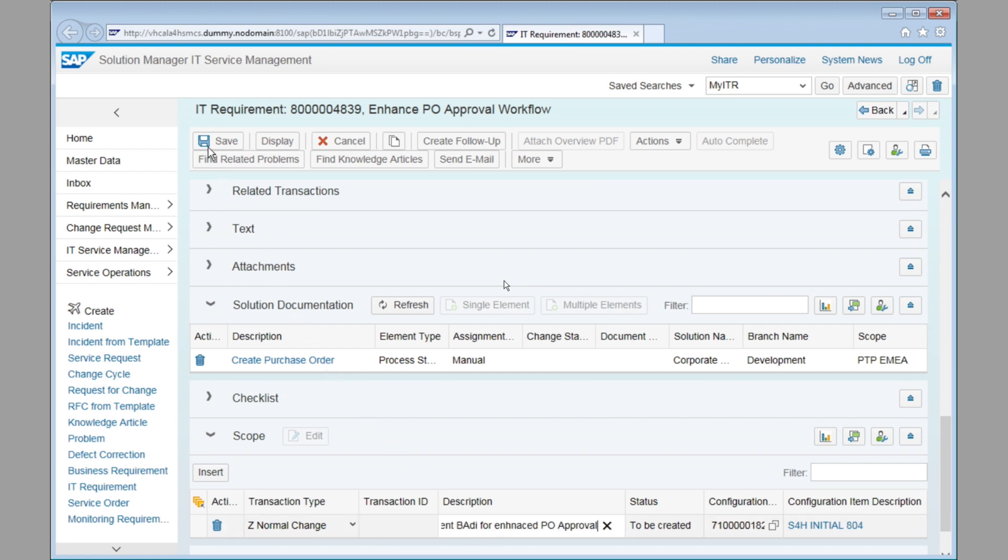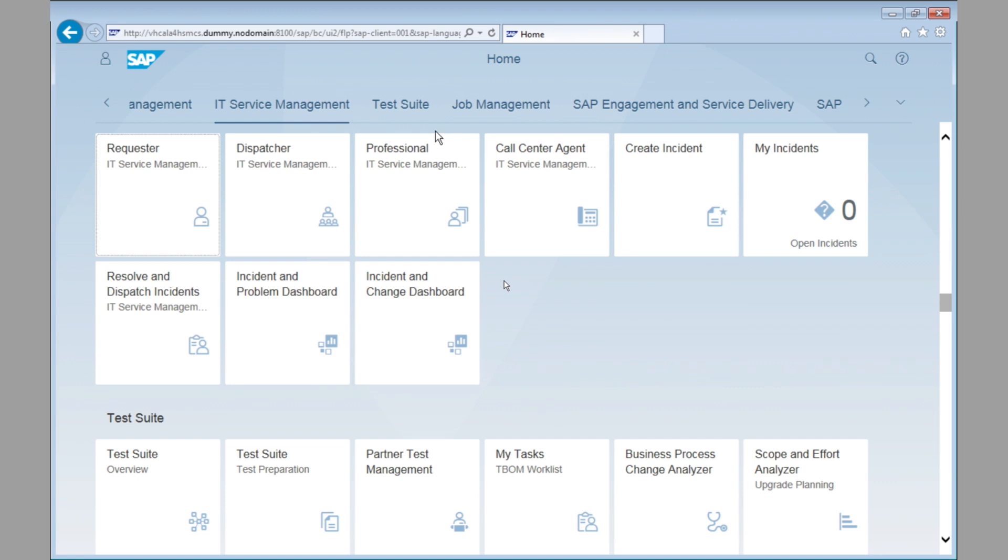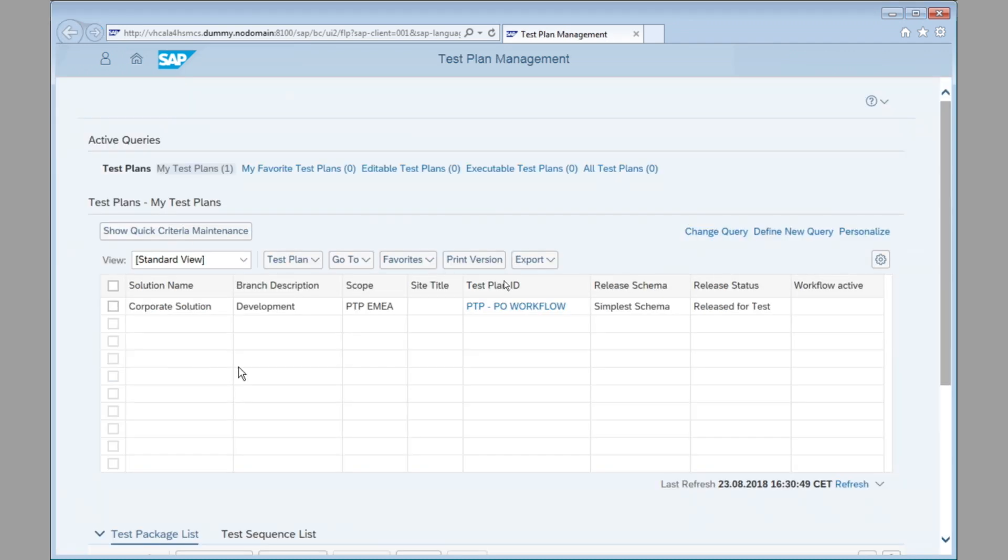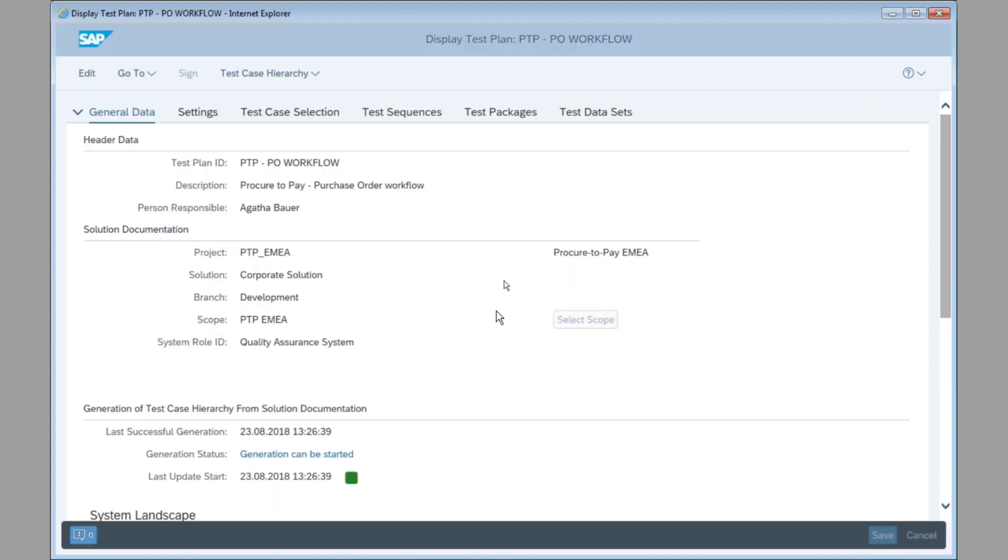Once this is done, we can go ahead and start preparing the test and executing the test. Preparing the test is done in test plan management. So let's go ahead and start test plan management. The name of the test plan is called procure to pay for purchase order workflow in this case. And you see, the test plan is assigned to the project, P2P EMEA, and it is also automatically getting the information about the scope, the branch, and the quality assurance system where the test is then being executed.